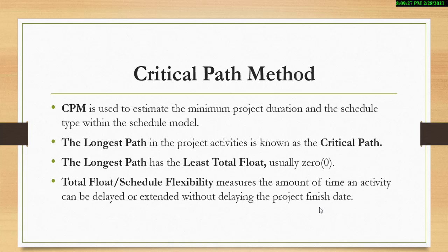It means that when the total float of an activity is 0, that activity is very critical, and in that sense you can't delay that activity because the total float for that activity is 0.